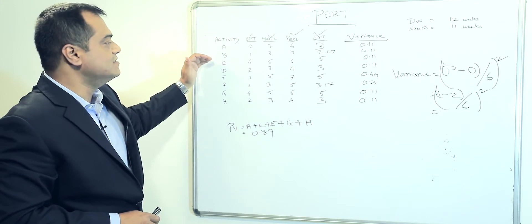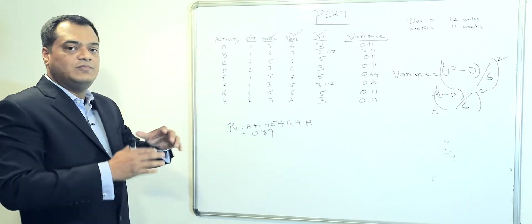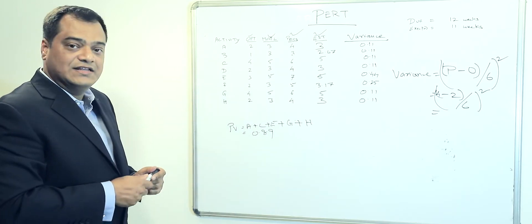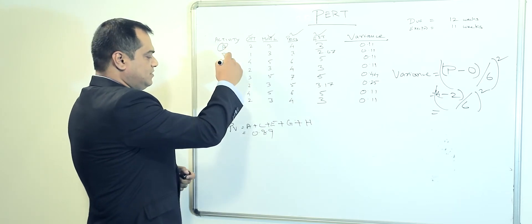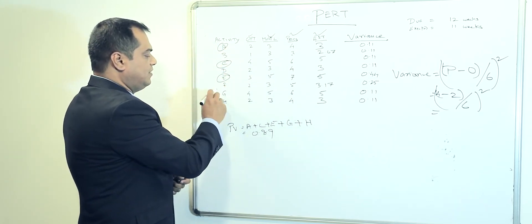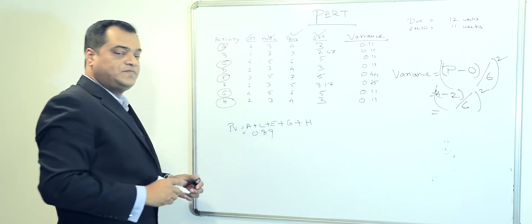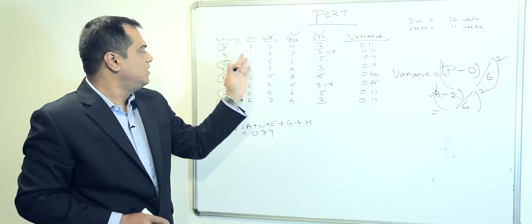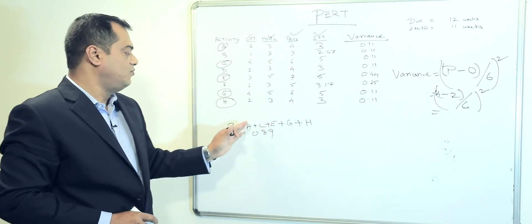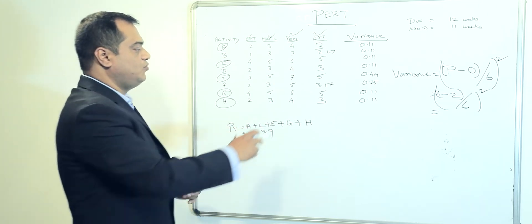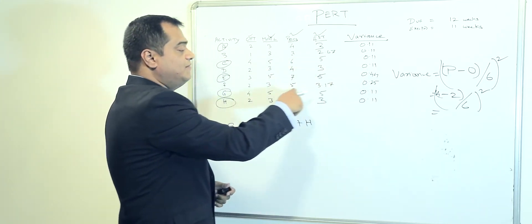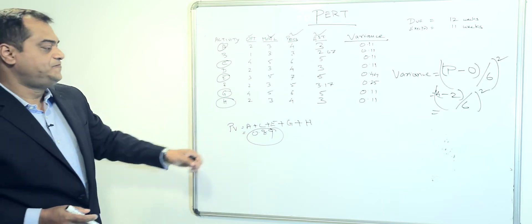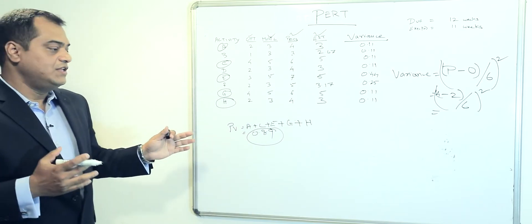Once we have individual variances, we want to find the overall project variance. The critical path in this case is A, C, E, G, and H. We plot the variances of all critical path tasks and combine them together — 0.11 plus 0.11 and so on — giving us a project variance of 0.89.